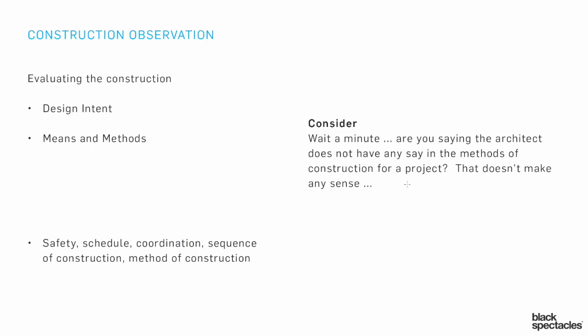Clearly you have quite a bit to say about the methods of construction for a project. You're going to have on your drawing sets how the concrete's going to work, what kind of formwork to use for that concrete, the spacing on the rebar, how you're going to put an anchor bolt in at every six feet to put the sill plate on, and what the method of doing the construction for the walls up above. All of those things are things that you're drawing, and those are clearly construction means and methods.